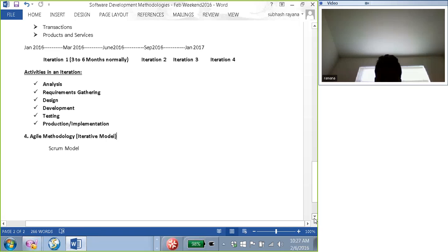There is a special PMO team responsible for interacting with the technology team on a weekly basis, identifying what was done that week, setting up a meeting, and reviewing everything, and they will also report the project status. Technically, let us say the project is a 3-month project. At the end of the first week, you should be at least 4 or 5% complete. At the end of the second week, you should be around 10 or 12% complete. In this way, on a weekly basis, they keep tracking the progress.